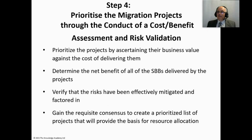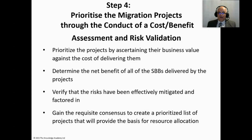Step four: prioritize the migration projects through the conduct of a cost-benefit assessment and risk validation. Prioritize the projects by ascertaining their business value against the cost of delivering them, determine the net benefit of all solution building blocks delivered by the projects, verify that risks have been effectively mitigated and factored in, and gain the requisite consensus to create a prioritized list of projects that will provide the basis for resource allocation.